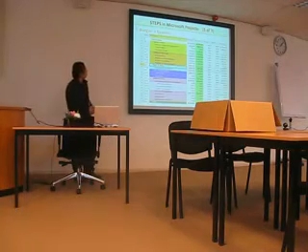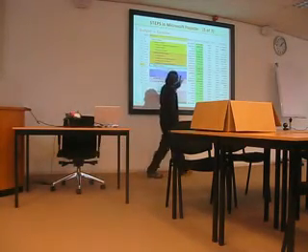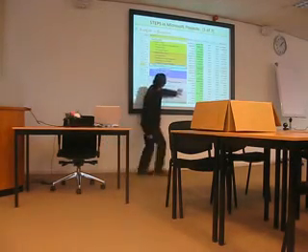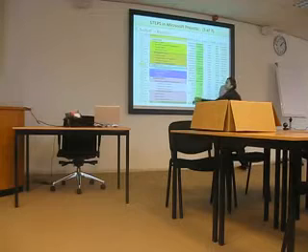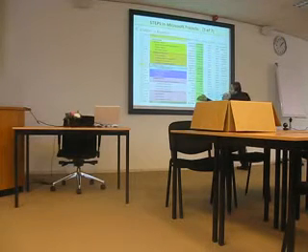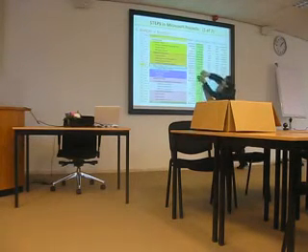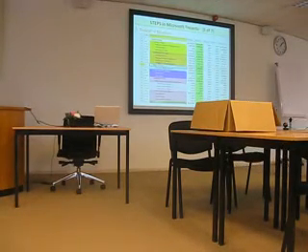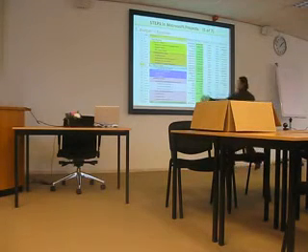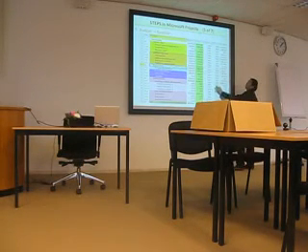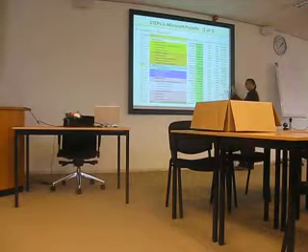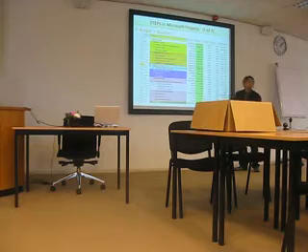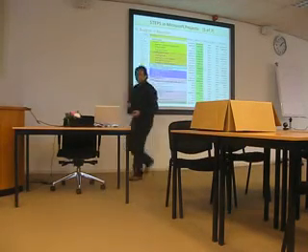Okay, this is the baseline. This is the beauty of how we group the tasks. If you group the tasks, then Microsoft Project can sum up. See this one? Sum up to here. And then finally you get 69,750. It's very good. And then you create the baselines. After you create the baseline, you input the actual cost, and then Microsoft will calculate the remaining cost you have and the variance between actual and baseline. It's a very good feature.